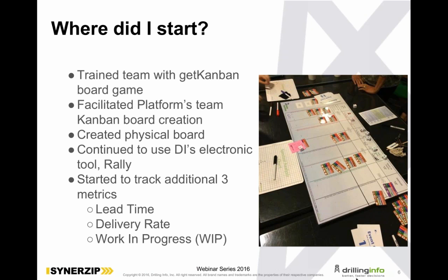And then after we played the game, if the team was interested, I had a follow-up 2 to 4 hour workshop, depending on the size of the team and how much they wanted to debate about their boards. But it helped facilitate their Kanban board creation. I use an approach called STATIK, which is a systems thinking approach to implementing Kanban. You can go on any search engine and search for that, and you can read a whole bunch about it. But it's basically 7 to 8 steps that you take in order to create a board and roll it out.